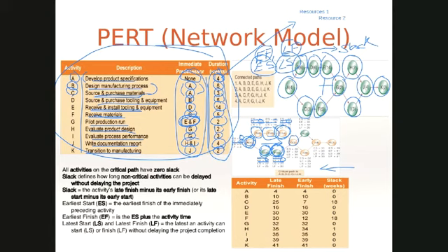That tells you that suddenly this task finishes about 18 weeks prior to this task, which means if you, as an executive or a manager, are deciding on resource costing, you know that F will be done 18 weeks prior to G, which means that you can now schedule your resources strategically and say that I don't need the resources that I would have used for F for 18 straight weeks.